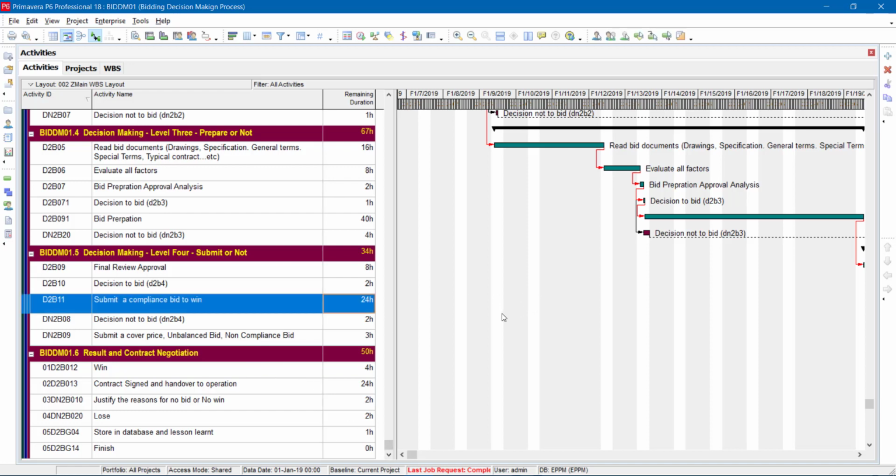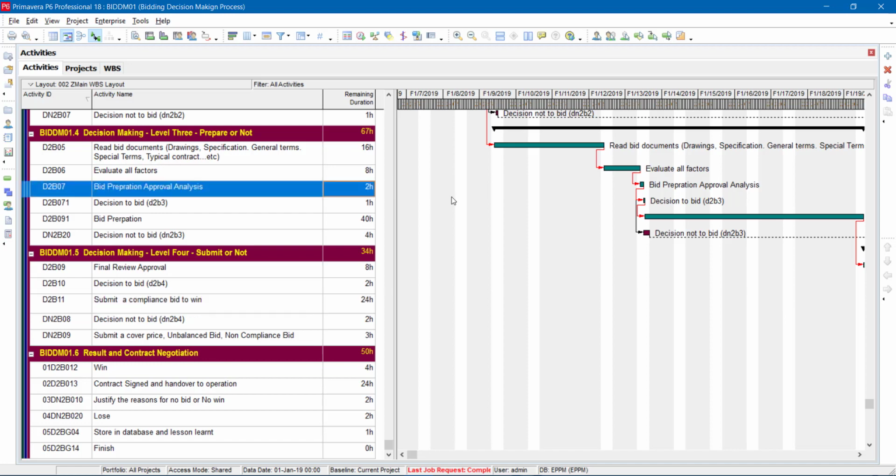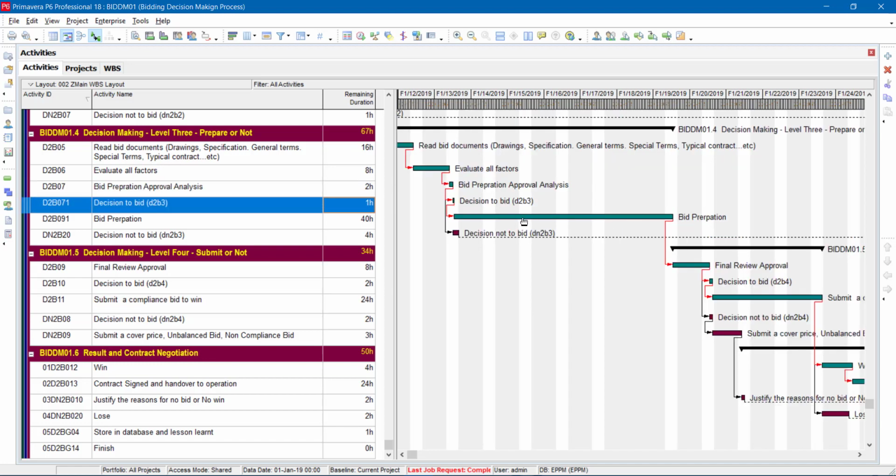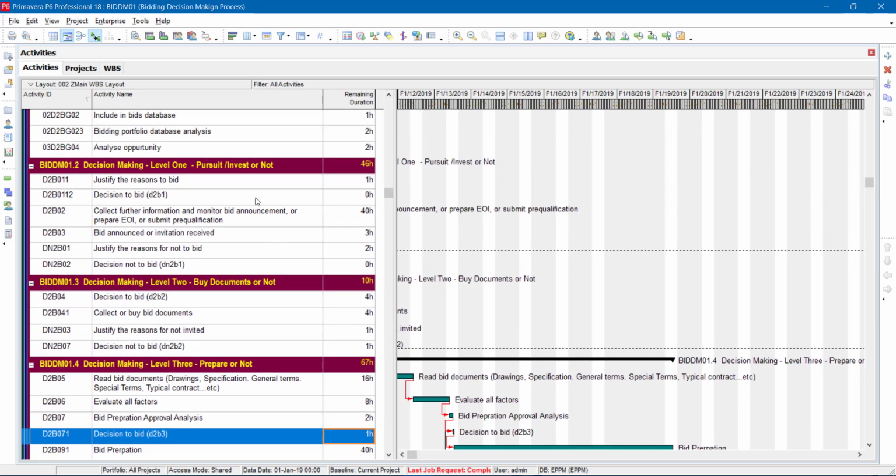Sorry, in the third, which is the preparation and submittal, it is based on the tender type. Some bids might just be typical, copy paste and finish, but some of them need very high technical input, calculations and thinking, and it might cost you a lot. So your cost will be concentrated in the third stage and in stage number 1. So level 1 and level 3.